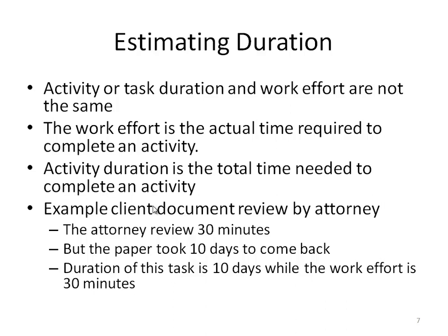To estimate the duration of a task, we need to understand the difference between the task duration and the work effort. For example, reviewing a document by an attorney requires 30 minutes, but the paper took 10 days to come back. The work effort is 30 minutes, while the task duration is 10 days.